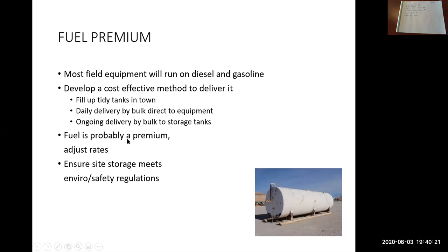So fuel is more than likely at a premium. You're probably going to pay more per liter out of town than you are in the lower mainland here. And again, it's simply calling around, asking if there are bulk carriers in the area and what they charge, so you can make that adjustment in your estimate.